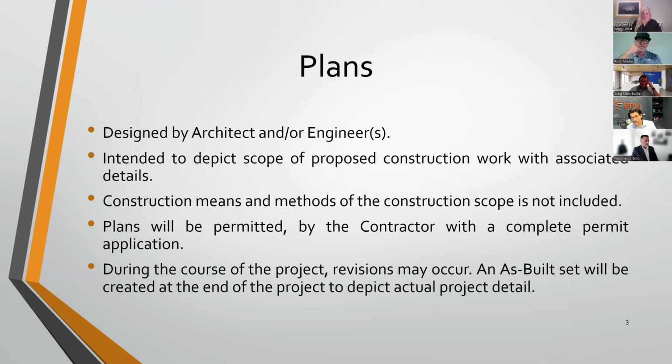Once a contractor is selected, ultimately it'll be turned into a permit set. That permit set will get submitted by the contractor to the municipality, or whatever the authority having jurisdiction may be, to obtain that permit. And there may be some iterations back and forth, some comments may occur, and they'll just be tracked. And then once that actual permit is obtained and you're off to the races, that becomes a construction set.